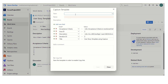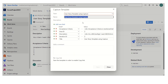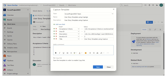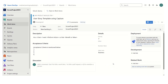Now let's say this is my user story template using capture. I need to select the team and my name. Earlier I was making a mistake — I didn't select the team. Now I have selected the name, selected the description, and these are the fields I have populated. I can now click on save. So this template we have created using the capture flow.